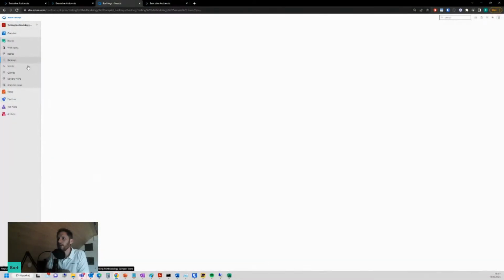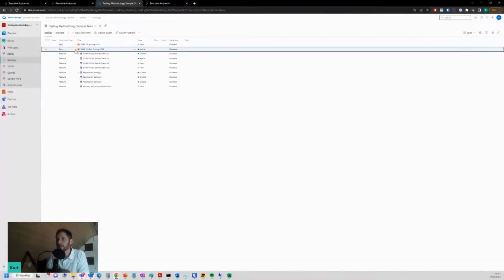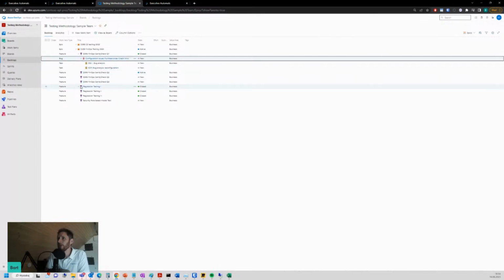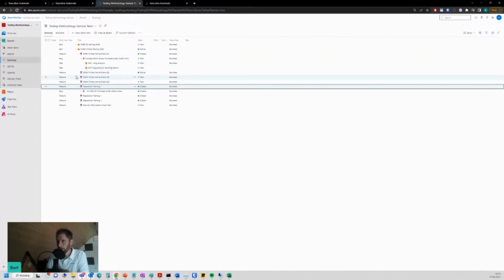In the backlogs, we have an example of a structure which starts from epics. This indicates what kind of project type we've got. This is a Scrum, and this helps you track the current process and findings. Epics are summarizing, in that case, all test cases which were done for FinOps, finance and operations, and all results for the sanity check, the so-called smoke test, on the other hand. They are aggregated here,